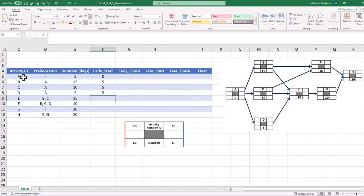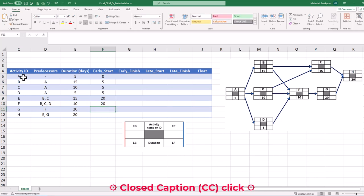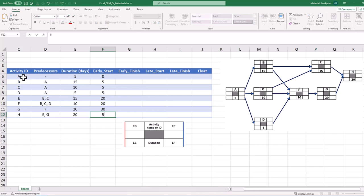Activity B has a long duration of 15 days. It will finish on day 20, which will be the early start date for activities E and F. Network forward passes continue to find the early start date of 30 for activity G and 50 for activity H. This concludes the first step in calculating our project's critical path in Excel.